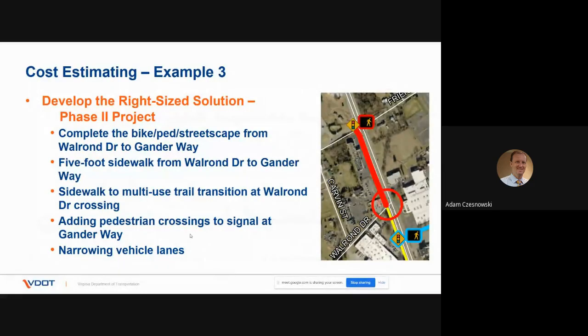So since the project was actually partially designed under phase 1, it had the advantage of being between 60 and 90% designed when it was removed from the phase 1 project. That meant the termini were well identified, and the major site features were already determined. So knowing the scope was actually pretty easy for this project. Well-defined quantities, and recent bid information was used to determine unit prices at the time of the application. We looked at those. They looked pretty good compared to our bid tabs.